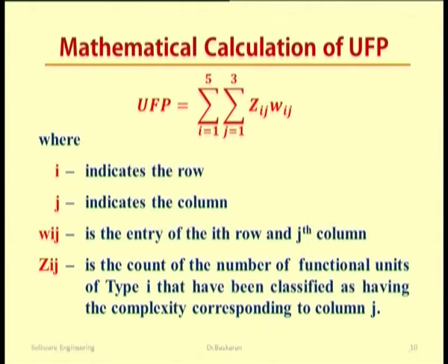get unadjusted function points. But our intention is just to calculate the function points as a whole, where this particular function point might take up a threshold value. Whatever we calculate will be an unadjusted function point count, which is purely based on all the 5 functional units, but then that will not be specific. Maybe some other external factors also would come into picture. So we just have to multiply these unadjusted function points with all those external adjustment factors.